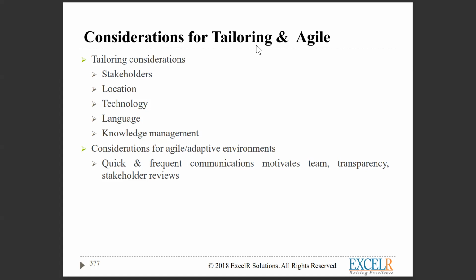So the conclusion is that whatever is with us, we should immediately throw out to others. In the moment, communicate: send an email, send an action plan, talk to the manager, talk to the stakeholder. Boss, I am going to deliver on so and so date. If you are confident, once my testing is completed, see the test results. My system test is completed, done. This is there in the sandbox. Then on this day, I am ready for UAT. Please let me know who all the stakeholders are.